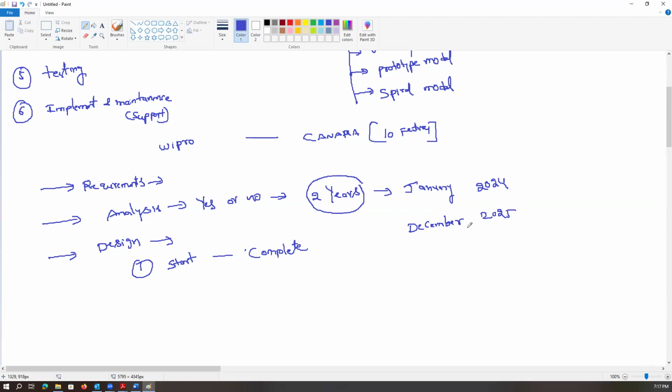This is to give to the customer in December 2025, so this is not complete in the company. To give it to the customer in December 2025, at least these people should complete in October 2025. Then we have November, 1 month grace period, and if any problems are there, we can take care. So there should be some grace period, right?